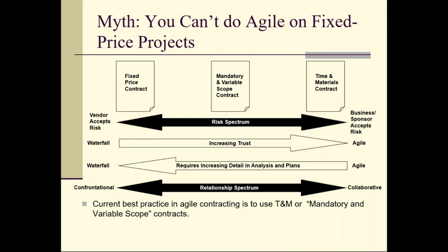If you come up with new items, because this is a high change project, if you identify new items that you want during the project, hey, no problem at any time. I'd be happy to add it to the list and tell you how many points it's going to be. Is that scope creep? No, because nothing in that list is actually in scope until it shows up on a signed authorized work order at the start of an iteration or a sprint. So these work orders are essentially like change requests, adding specific scope into my responsibilities, one iteration at a time.